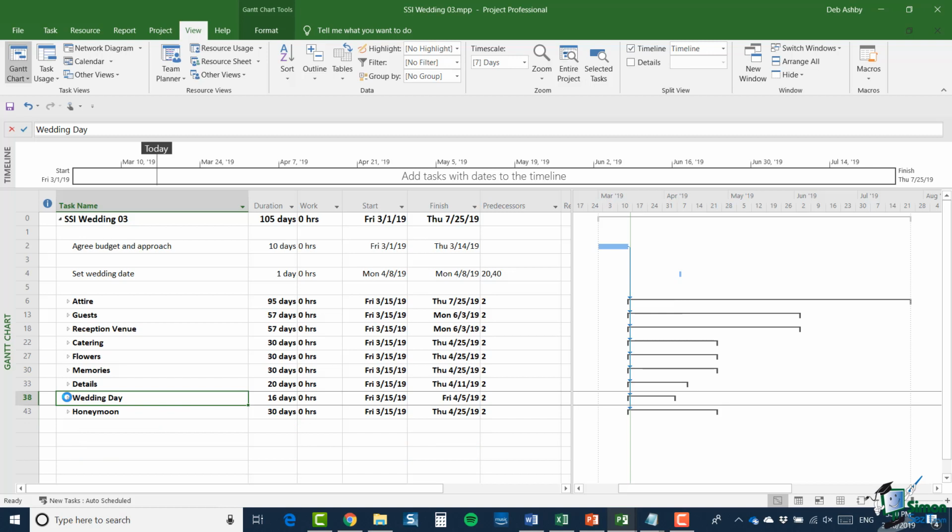So just really to emphasize the point that when you're looking at a project with some summary tasks collapsed, you need to be careful at what you're interpreting, because some elements of the project may have become invisible even though they're actually quite significant.